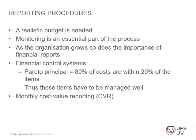Firstly, regarding reporting procedures: a realistic budget is needed. Monitoring is an essential part of the process. As the organization grows, so does the importance of financial reports. Financial control systems — the Pareto principle applies here, where usually 80% of your cost lies within 20% of your items. So if you manage 20% of your items very well, you can manage 80% of your costs very well. Thus, these items have to be managed well.